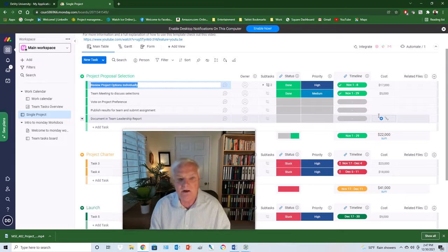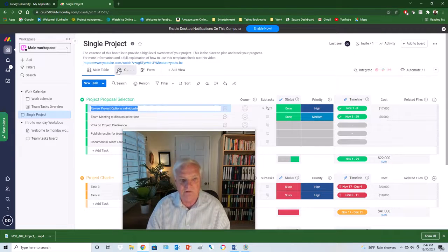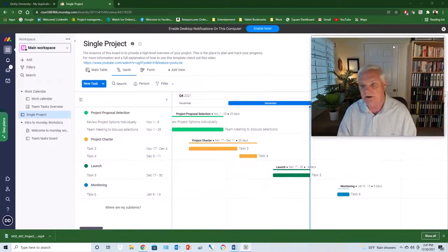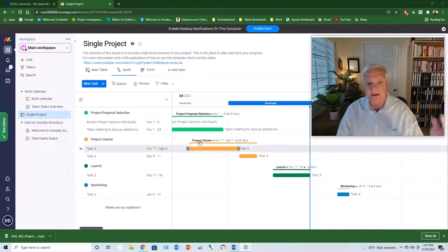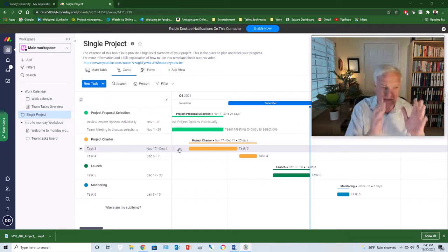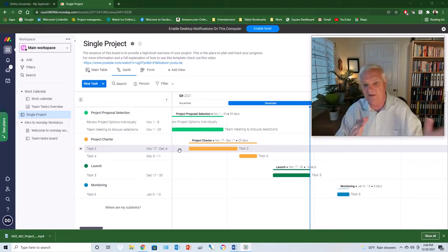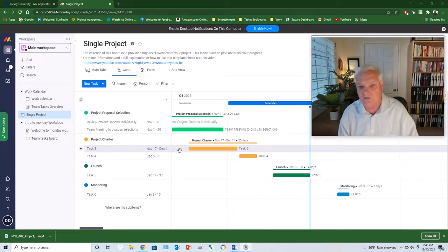Ultimately, that's going to create for you the ability, rather than main table view, you're going to switch over here to Gantt. And once we toggle to the Gantt view, let me move myself over here now, you can see that what we've got is the ability to create a hierarchical leveled predecessor successor logic embedded, semi-smart, not fully smart. You can't really pull earned value from this because we can't create a baseline and then move forward to creating additional work to find out what the detail or the leveling beyond that would be. But it gives you the ability to see the structure of the project.